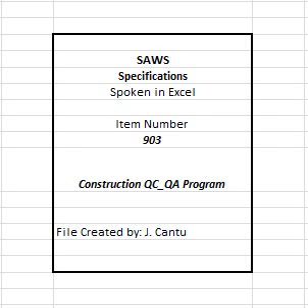The contractor shall develop and submit, for review by SAWS, a detailed project-specific quality control plan after receipt of notice of award and prior to the pre-construction conference. It shall be reviewed and formally accepted prior to the initiation of construction.